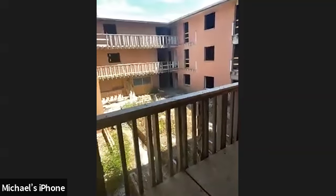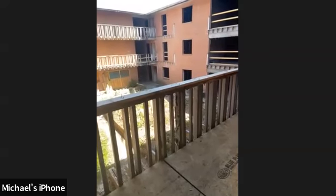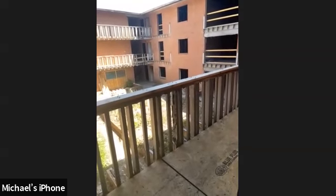Okay, we're replacing the stairs and the balconies. Two of them, it looks like, on the ground floor. I didn't see any evidence of moisture coming through the wall from the exterior. So we're not planning on doing anything in terms of French drain or anything around the bottom? There'll be a new drain inside the exterior patios. When we do the new walls, that concrete will come out, and there is an existing drain there that we'll check to see what needs to be done. All right.